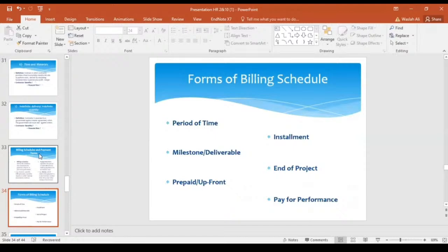installment billings. Installment billings are issued for the same amount each month. The amount is calculated in this type of billings based on a formula, which equals IB equals total contract divided by equal installment periods.